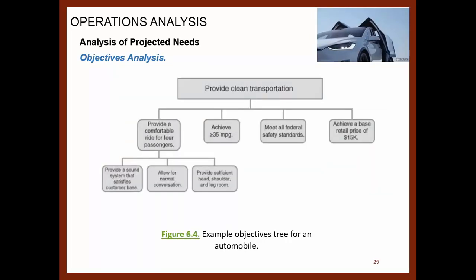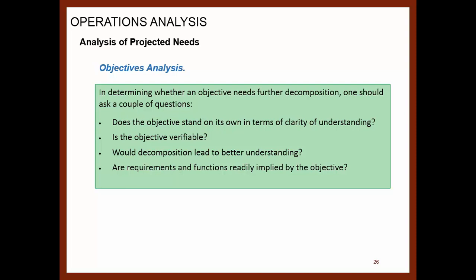So, how do you know when to stop? In determining whether an objective needs further decomposition, one should ask a couple of questions. Does the objective stand on its own in terms of clarity and understanding? Can you verify the objective? Will decomposition lead to a better understanding? And finally, are requirements and functions really implied by the objective? If the answer is yes to all these questions, then you don't have to decompose them more.